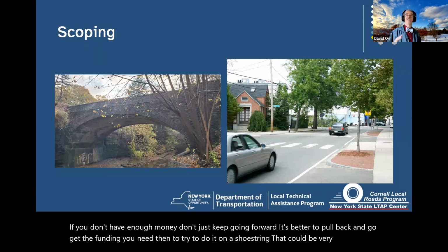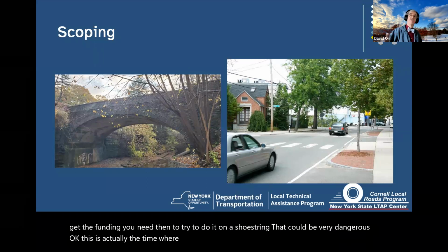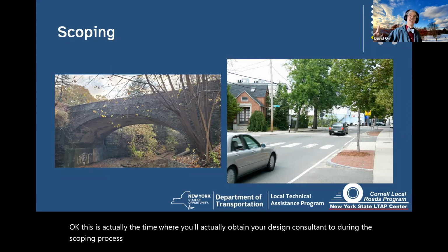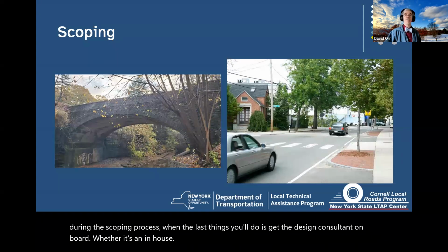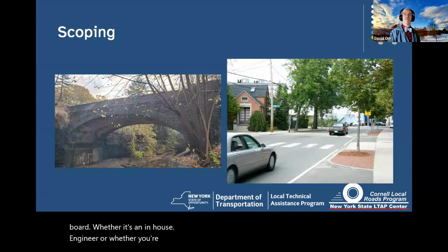Okay. This is actually the time where you'll obtain your design consultant too, during the scoping process. So one of the last things you'll do is get the design consultant on board, whether it's an in-house engineer or whether you're hiring a consultant. Could be one you have on retainer, but again, be careful of the process.